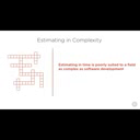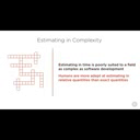Alan explains, given the inherent unknowns of software development, estimating how long it will take to complete a software development task that you've never attempted before is pretty difficult. Plus, humans are generally pretty bad at estimating time, especially in exact amounts. But humans are actually pretty good at estimating how large a problem seems relative to another problem.